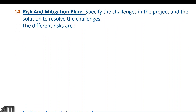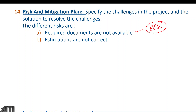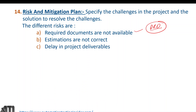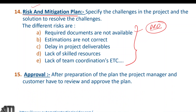Risk and mitigation plan: specify the challenges in the project and the solutions to resolve them. Different risks include: required documents not available, estimations are not correct, delay in project deliverables, lack of skilled resources, and lack of team coordination. These risks should be documented in the risk and mitigation plan section. The mitigation plan describes how to resolve each risk.